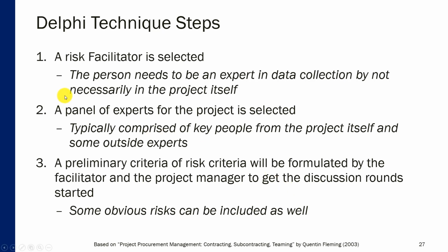So this is the essence of the method, and this method relies on the following specific steps. First of all, selecting a facilitator. A facilitator needs to be an expert in data collection or the Delphi technique, but not necessarily the project itself, because the goal of the facilitator is to facilitate exchange of information and not to contribute to this session from the knowledge side.